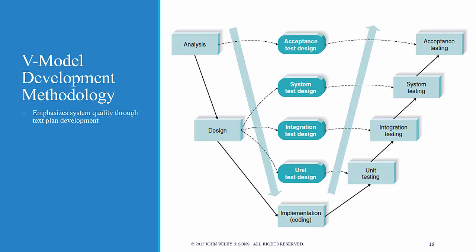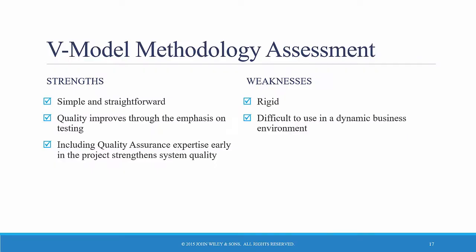A key concept of this model is that as requirements are specified and components designed, testing for those elements is also defined. In this manner, each level of testing is clearly linked to a part of the analysis or design phase, helping to ensure high-quality and relevant testing and to maximize test effectiveness. The V-model approach is simple and straightforward and generally improves overall system quality through early development of test plans — that's the hallmark characteristic of the V-model. Projects benefit from an earlier focus on testing, and quality assurance personnel's expertise increases the overall quality of the system design.